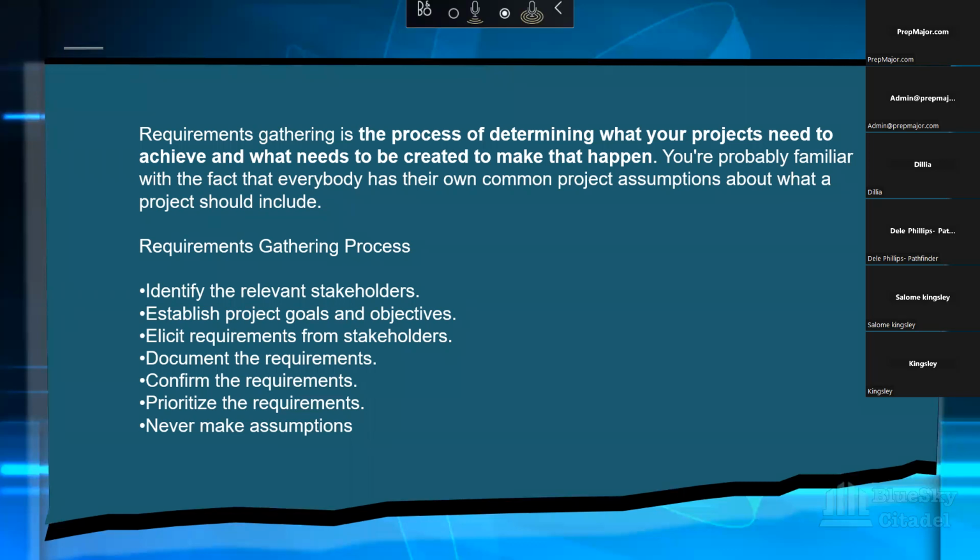There are requirements that should have, there are requirements that could have, and there are requirements that won't have for this sprint. We'll have it in future. So prioritizing your requirements helps you know the deliverable for each sprint, because every sprint has a deliverable.